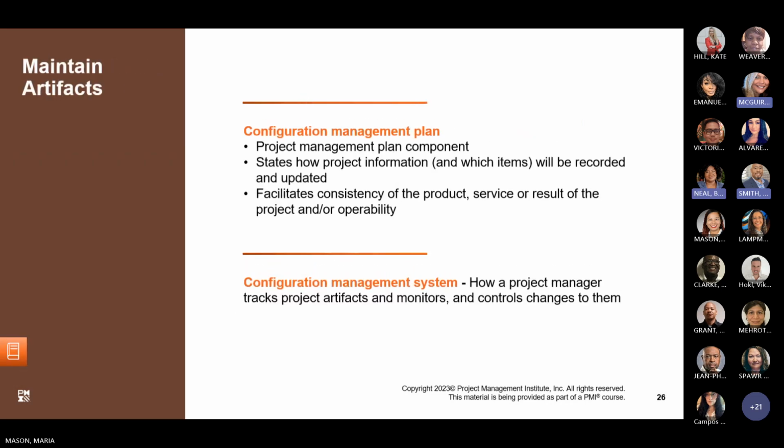Maintaining the artifact. Some projects use a configuration management system to track the project artifacts and monitor and control the changes. There will be a configuration management plan if projects have a configuration management system. The project management plan is a component of the configuration management plan, and it states how the project information and which particular items will be recorded and updated. The plan also facilitates consistency of the product, service, or result of the project and/or operability.